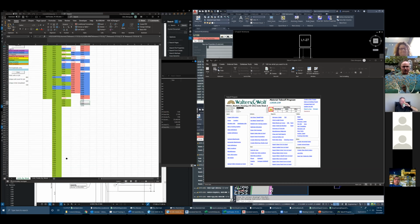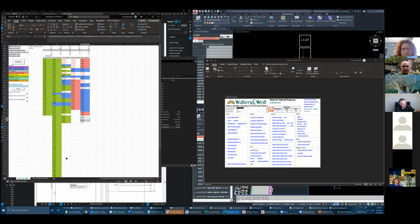Yeah, and so our pace, the releases are by week. So you might have a job that has 6 weeks or 8 weeks, and we'll follow that same release pattern that the shop is using. So we'll try to do a release each Friday. And like Chris pointed out, we may have some weeks that have more units that need to be built, and we may need to apply additional resources in order to maintain that weekly pace.